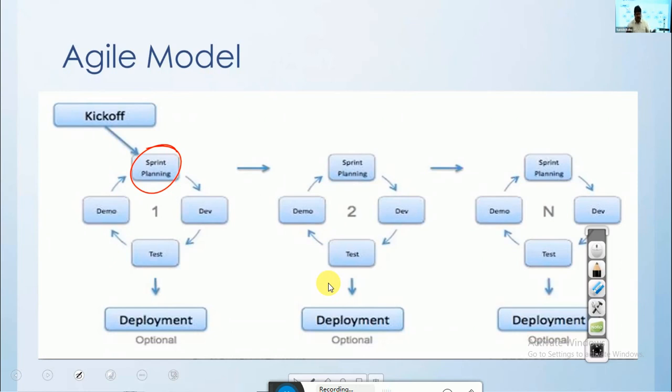And here, clearly time deadlines are given, 1 day, 2 days. By tomorrow evening, code should be ready for these 3. By tomorrow evening, test cases should be ready. Again, a meeting organized. Whatever code is implemented by the development team needs to be demonstrated. Whatever test cases you created need to be demonstrated to the Scrum Master.